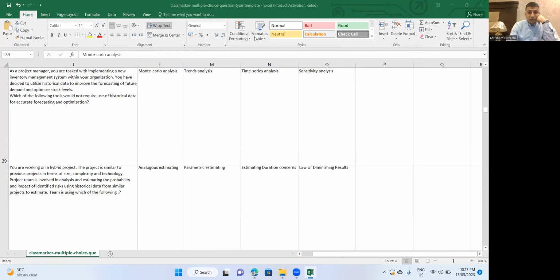If you run all those risks through Monte Carlo analysis, you would be able to get the confidence interval around the end date.